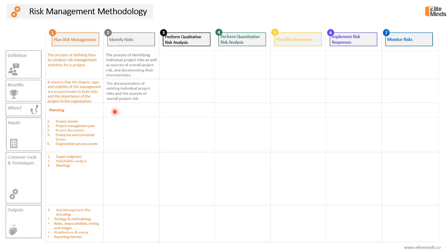The key benefit of this process is the documentation of existing individual project risks and the sources of overall project risk. We will focus not only on individual project risks but also on sources of overall project risk that impact more than one project objective. This process is conducted as part of the planning phase. We will need many project management plan components like the requirements management plan, schedule, cost, quality, resources, and risk management plan, in addition to the performance baselines.